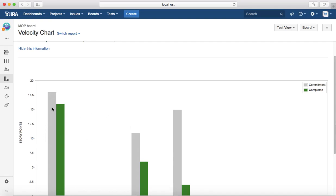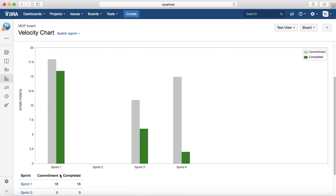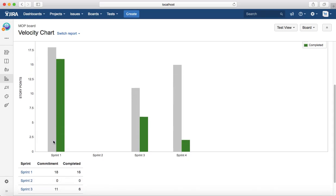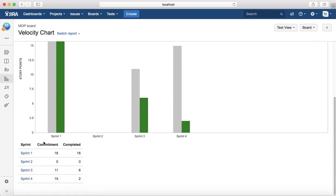In Sprint 1, the commitment was 18 points and green is the actual delivered story points or the tasks that were completed in that sprint. Below that you'll see the table.